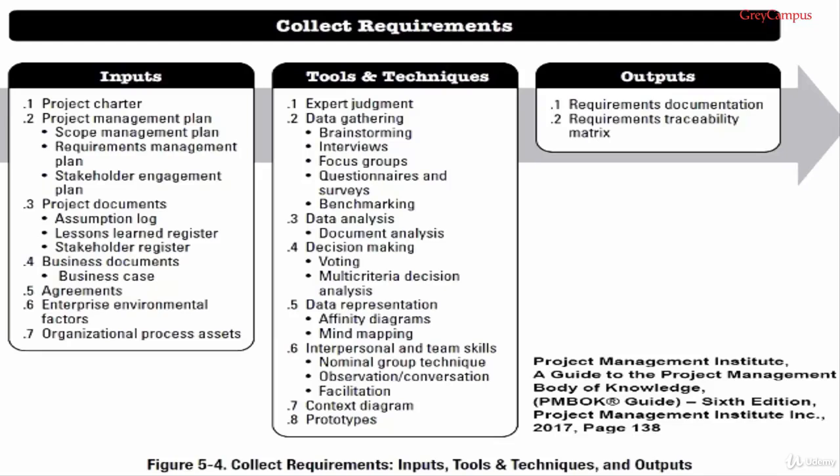your bases are covered. And a huge tip here, as you proceed through each of these processes and benefit from the lessons learned from previous projects, please make sure that the team records lessons learned from the project as they learn them. This is for the benefit of future projects. And another big tip is don't wait until the end of the project to record the lessons learned. Record them as you go, because at the end you'll have forgotten them, you will have misremembered them, the people with important lessons will have left, or the back of an envelope you'd scribble it down onto, the dog will have eaten them. So just record them as you go.